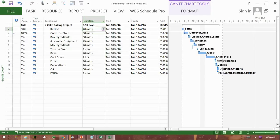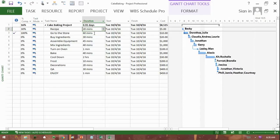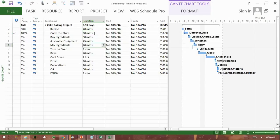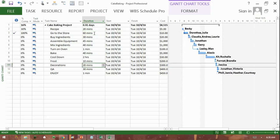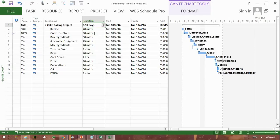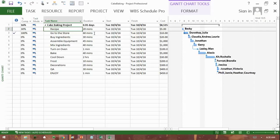And we also have the duration. A lot of times, activities will be quantified duration-wise in minutes, sometimes in hours, sometimes in days. But really, the big thing about sequencing the activities is about putting them in the order that they will occur and also having some logic regarding what we call relationships.